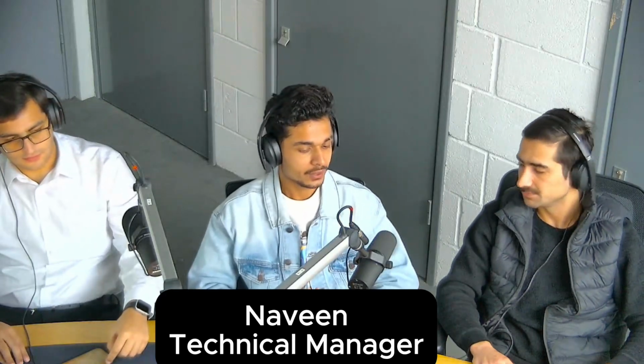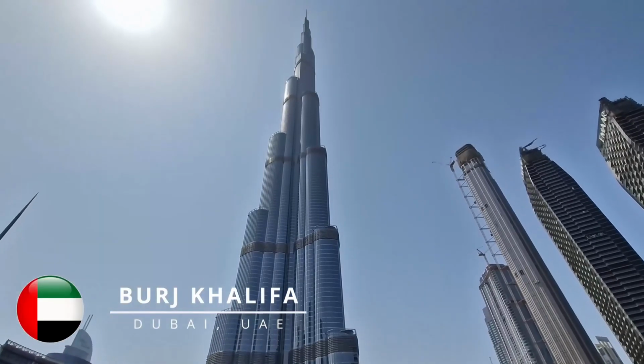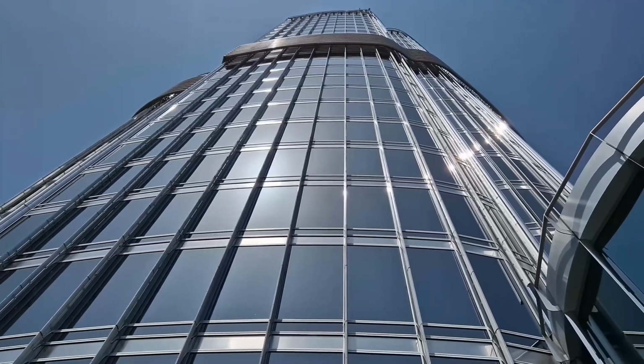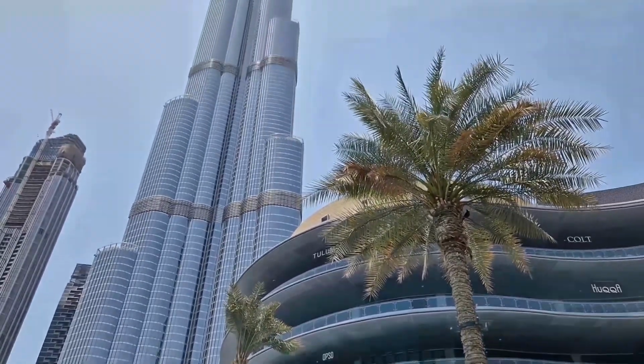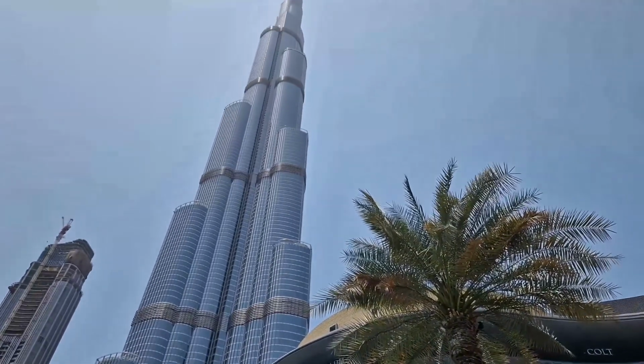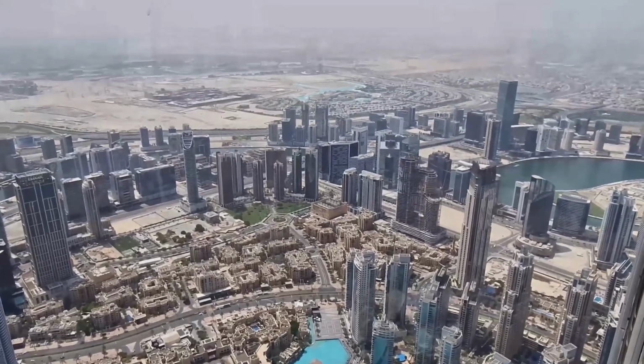Thank you, Yawar. Now we are diving in depth into the project life cycle at this stage. The project management team used Gantt charts to establish milestones for each section of the building. They also set up detailed risk assessments to anticipate potential delays from things like labor shortages, extreme weather, and some political changes. The project had to stay adaptable. For example, when supply chain delays impacted the concrete mix deliveries, adjustments were made to the schedule to keep things on track.